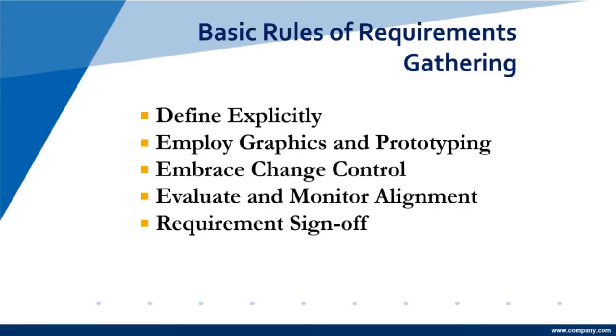And requirements need a sign off. Somebody has to say, yes, these are good. Generally, that is a stakeholder, at least a sponsor, possibly somebody who has that power. The person that is the money keeper, the sponsor, is one of the huge people that do it, but it doesn't have to be. It just has to be someone who has the ability and the wherewithal to make that kind of decision and sign off.